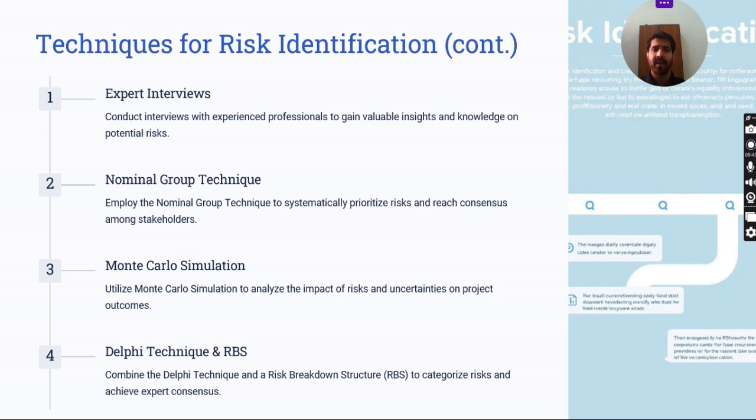Then the seventh one is Monte Carlo simulations. This one is a quantitative technique, which is data-driven, and is more effective. It utilizes statistical modeling to predict risk probabilities, assess potential impacts, and guide data-driven decision making.